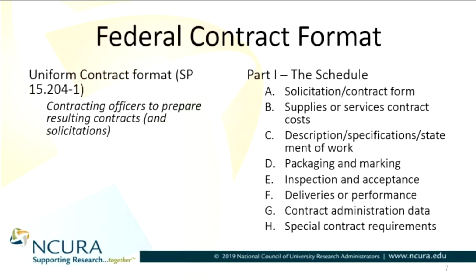And we so often, as research administrators, are accustomed to putting together a budget estimate based on the way that we've done costs in the past, and we often overlook items if, for example, we had a deliverable, and make sure that we include that shipping. But, for example, working at Caltech, there are sometimes deliverables that require extensive shipping, extensive packaging, and sometimes have to go to places that are very expensive to ship to.